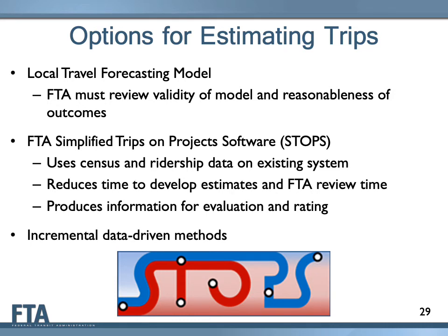If a sponsor seeks to use an incremental data-driven method, it must be discussed with FTA so that FTA can understand the data available to the project sponsor and its usefulness in estimating trips on the project. Project sponsors must choose one of these approaches and then use that approach to develop all of the project justification measures. In other words, a sponsor cannot choose to use its local travel model to develop information for some of the evaluation criteria, and then try to use STOPS for other evaluation criteria.